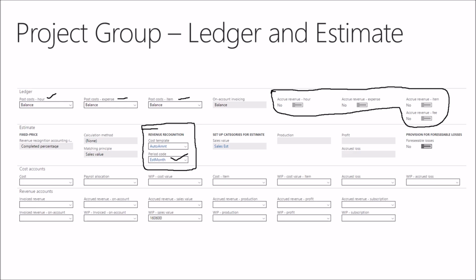So then the one above that is the cost template, and cost template is a way of grouping your costs together, and a way of helping you define what categories go into your percent complete calculation. And there's a little bit more to that. We'll get into the cost template more, but that's just the general understanding. I'd like you to think of it right now as two things: grouping your costs, or grouping your categories together, and how you can calculate percent complete.